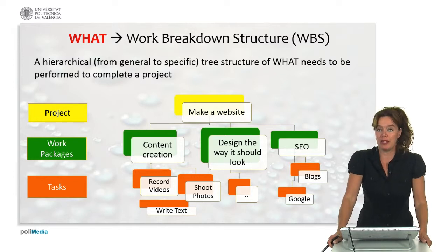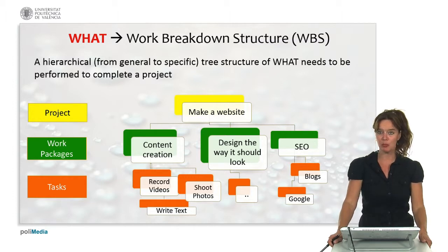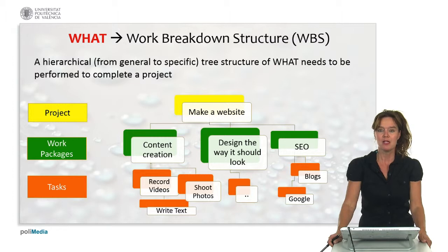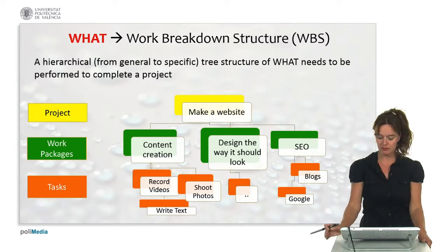Another possible work package is, for example, to take care of the SEO, the search engine optimization, because we don't just want to make a website, we want people to visit it. And if people need to visit our website, they need to be able to find it. So we need to optimize for search engines in order to find our website. So for example, we need to write about our website in blogs, or we need to configure Google Analytics, to make sure that our website is being found. So this is an example of a typical work breakdown structure, a WBS.